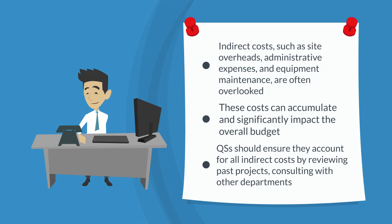QSs should ensure they account for all indirect costs by reviewing past projects, consulting with other departments and creating comprehensive cost breakdowns that include these often forgotten expenses.